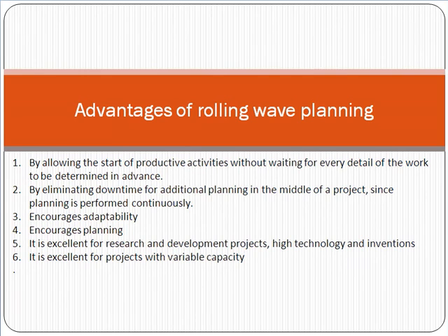Friend, what are the advantages of rolling wave planning? It allows us to start productive activities without waiting for every detail of the work to be determined in advance. It is a very good approach, friend, because once we get the project, we must start the project. We can't wait, because it's a very common thing. It eliminates downtime for additional planning in the middle of a project, since planning is performed continuously, and it encourages adaptability. It is excellent for research and development projects, high technology, and inventions. It is excellent for projects with variable capacity.